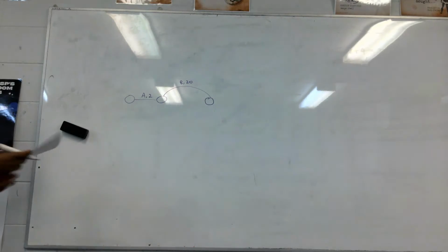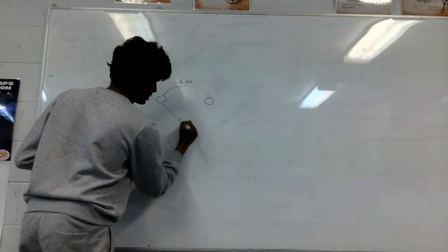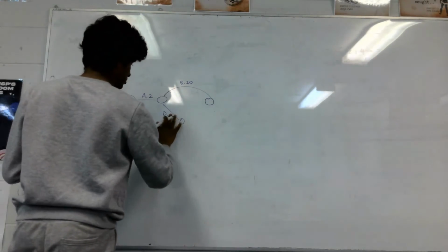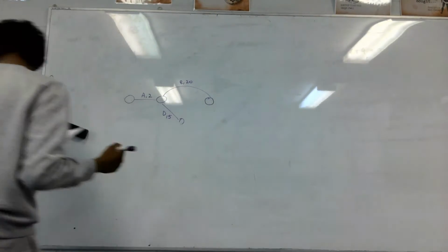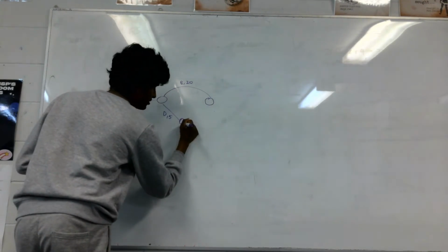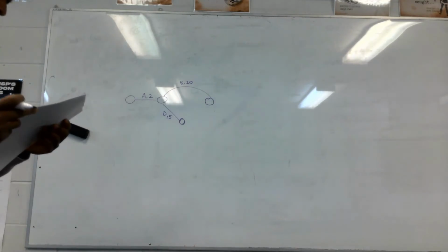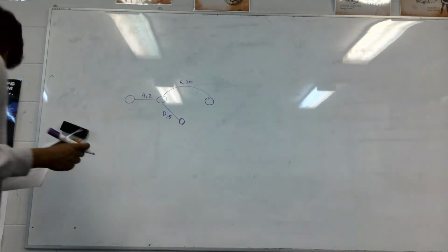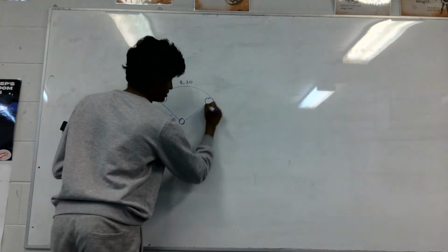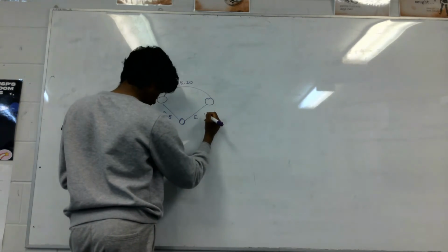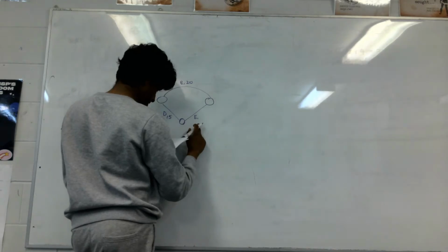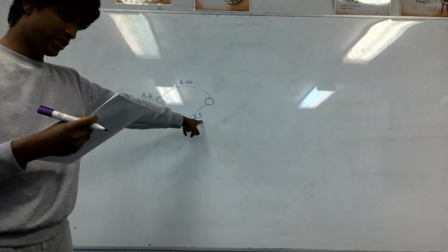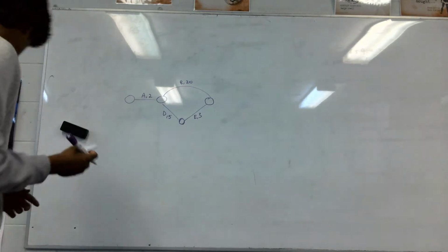And then you're going to have another task here. This is going to be D, 5 minutes. And then after B and E are done, we've got F. So this has got to come back here, and this is going to be E, because after D is E of 3 minutes, and until E happens, you can't have F happen.